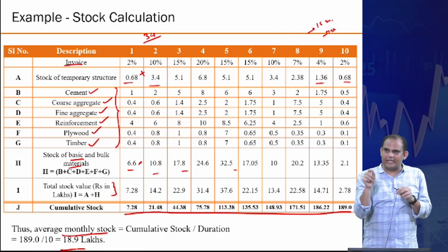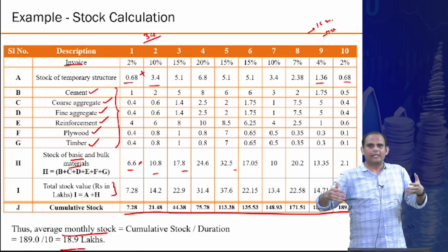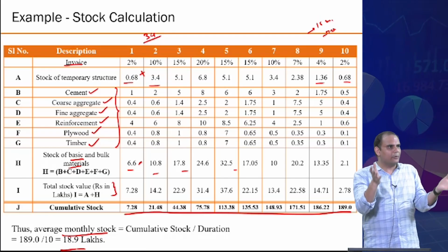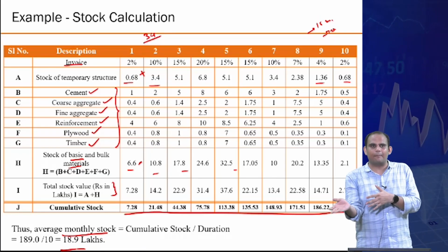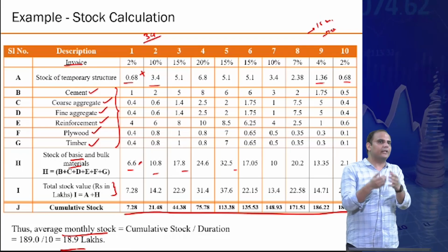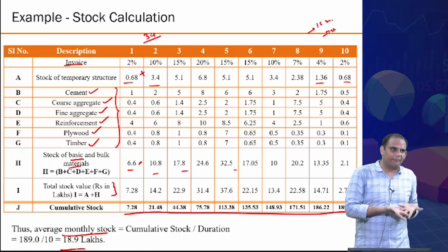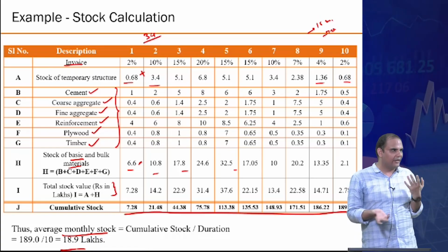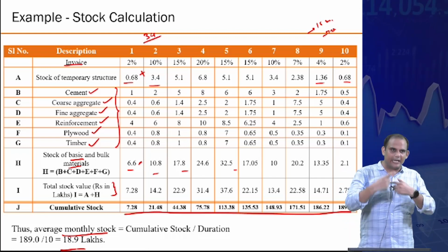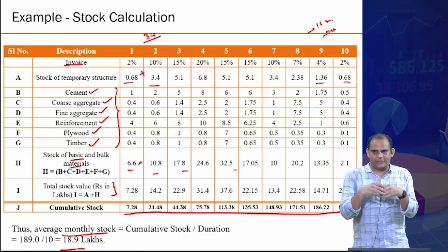And that is why most of the contracts you will see have this condition that for a particular project size, the client's financial health is also seen, right? That's a criteria. If you are doing 1,000 crore projects, you can't give it to a company whose annual turnover was 1 crore rupees, because you will easily expect that for a 1,000 crore project, 250 crores or something like that could be the working capital requirement. Now a company with total turnover of 1 crore, how will they raise the money of 250 crores to get a working capital, right? So therefore this criteria of financial health that a company can actually meet, temporarily you need to support that much money, right?